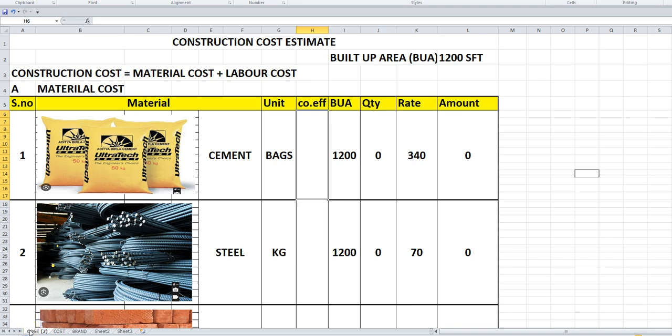In the finishing items, the customer may require improvement in the tiles, size of the tiles instead of 2 by 2, 4 by 2, and they may want tiles or granite at sill levels. They may require granite on the skirtings. So there are various requirements, plumbing, electrical, different brands, and so the base price is required. Anything on top of the improvement will be an additional cost. So specification is an important factor,